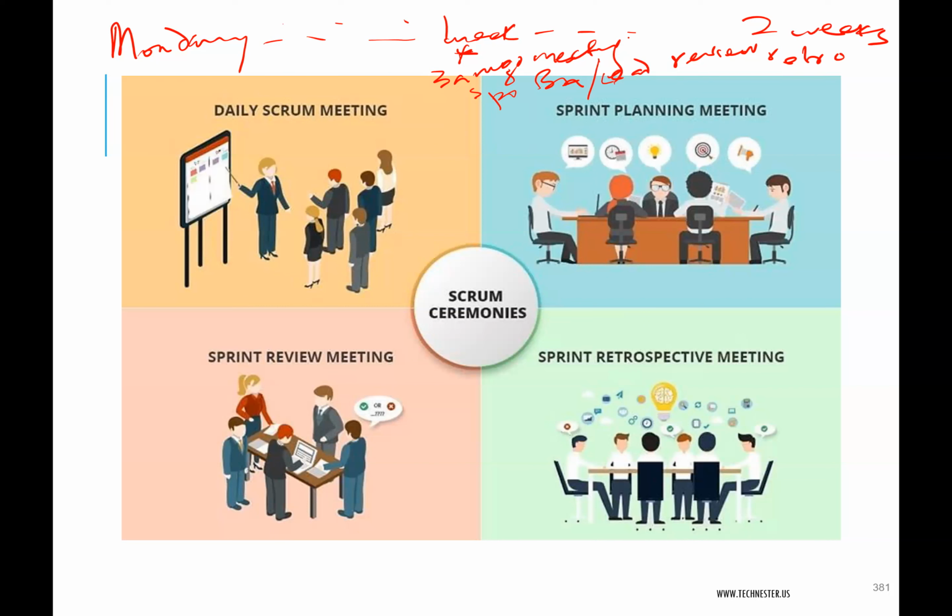They can ask questions, so that it's not on sprint planning day, which is the next day after the end of these 2 weeks, maybe the next Monday, if it's Monday to Monday. So let's say this one is ending on Friday. So that Monday, that's not when the development manager will be seeing the product backlog items for the first time. Or that's not when the product owner will start prioritizing. So we'll have prioritized, we'll have refined the backlog while the developers are working, so that the things they need for the next sprint are ready.